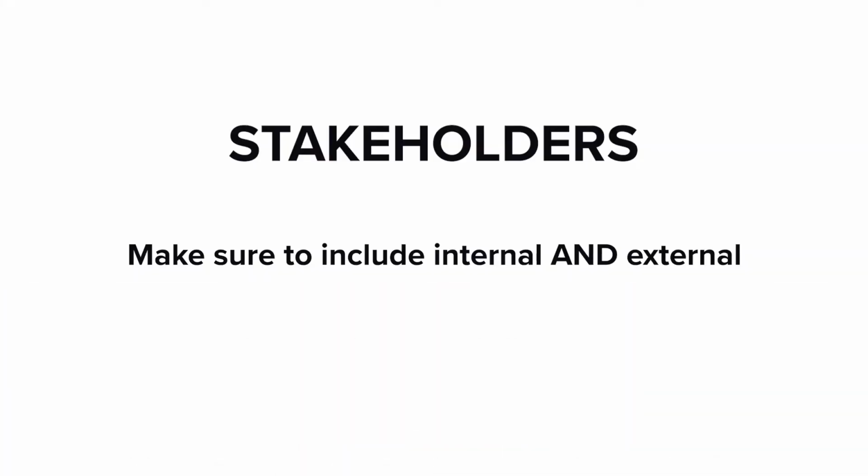Next, list all the involved stakeholders on your project. Now, this can be trickier than it seems at first glance sometimes. For a detailed breakdown on identifying stakeholders, check out our Coffee with Brett episode on how to identify and map project stakeholders. The short of it is to make sure you're thinking through the entire organization for anyone who could come in at the last minute and make a change that blows up the whole project. If you can get those people on board with your scope from the very beginning, the chances of the dreaded swoop and poop go way down.